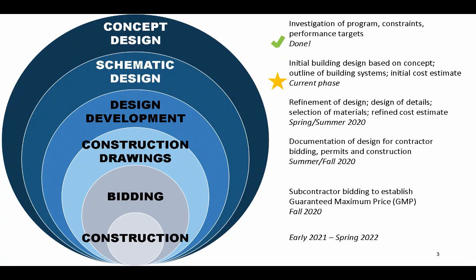And that's because when the architect or the landscape architect has finished one phase of it, say the schematic design phase, that's when they turn that work over and start reviewing it with the key stakeholders. And so we have periodic check-ins during that time, but that becomes a major milestone for them to communicate that work with us as the client. We talk with the key stakeholders.